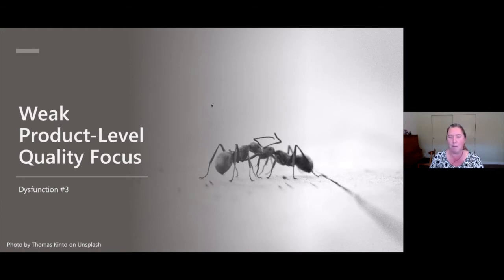And I ended up going in and really pulling the ripcord and saying, whoa, whoa, whoa, more functionality on unstable baseline is a bad idea. You're just piling more on top of more. You don't know any of this works at all. Let's stop the bleeding. Let's make sure that we actually have something that works well before you just add more things on top of it. So we want to make sure that we have the individual teams working well, but also those teams are contributing towards a high quality functioning overall product together.